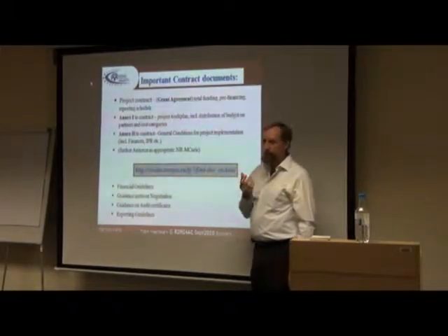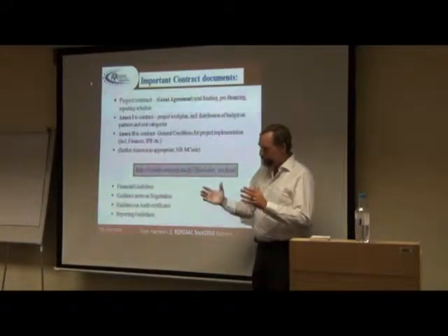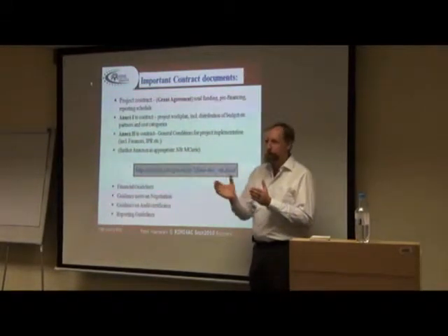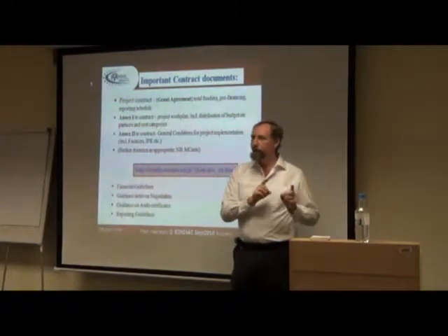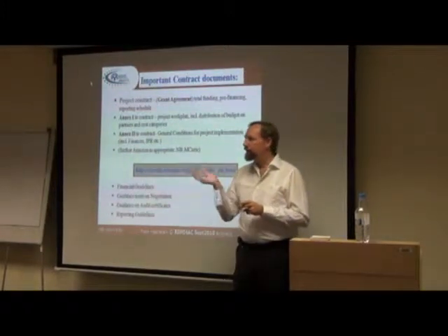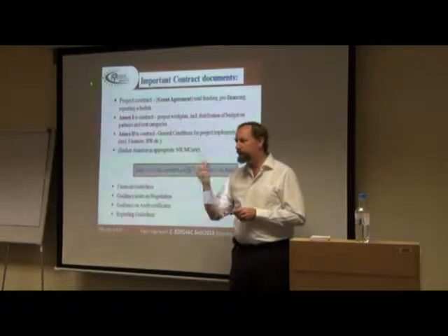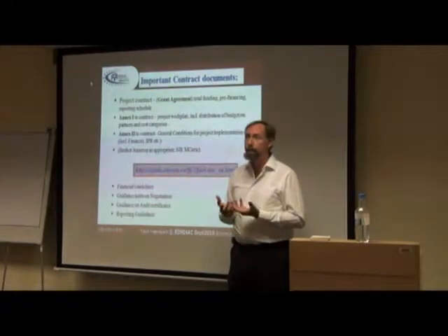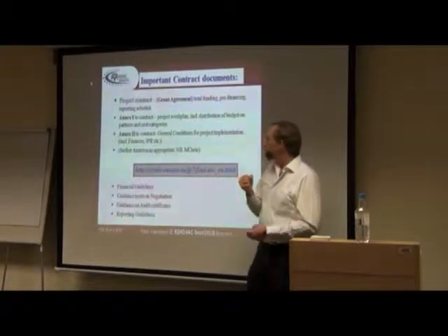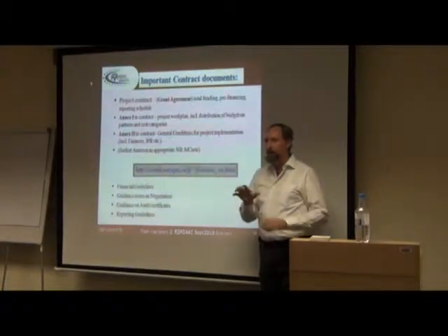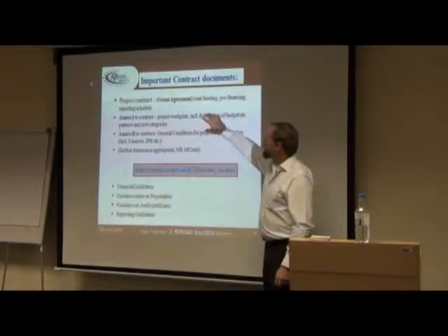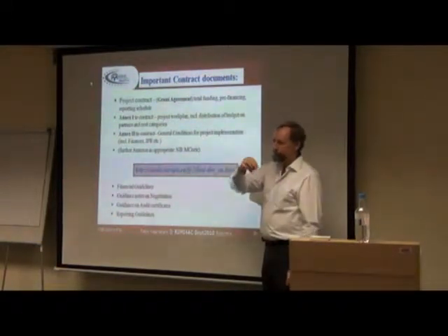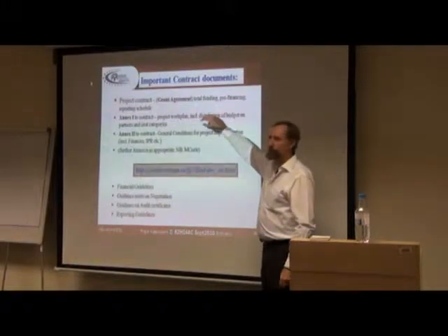The technical detail is in the Annex 1, and the Annex 1 to the contract is the technical description of what you promised to do. That is based on your proposal, but it will not be exactly the same. Some chapters are taken out, like the chapters about scientific references, contact details. Those are not legally important, they're taken out. But what is in there are the tables with deliverables, tables with milestones, your Gantt chart for time planning, and of course your budget.